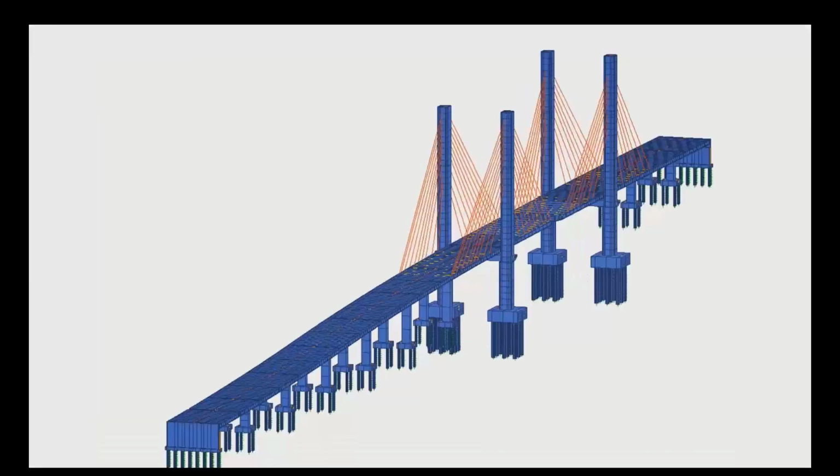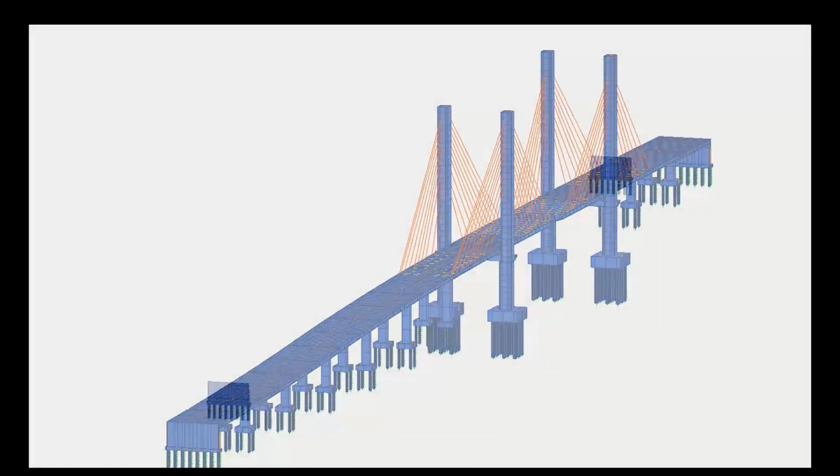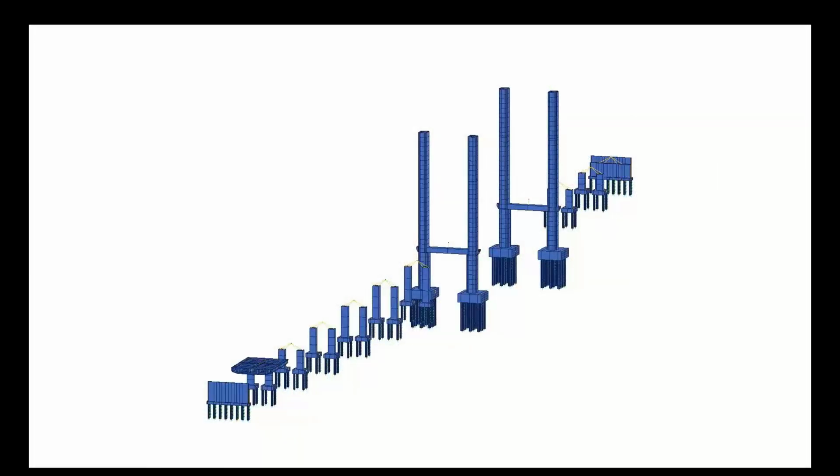The construction sequence is defined in the OpenBridge model. OpenBridge performs the analysis and design as per the build order, allowing also, from the structure point of view, a simulation of a construction stage, taking into account the construction duration for every phase through the analysis.